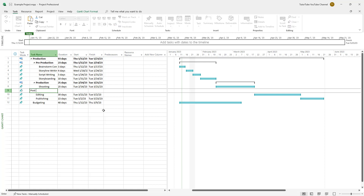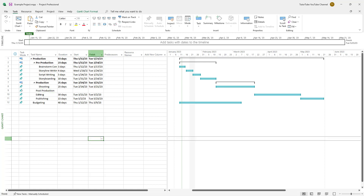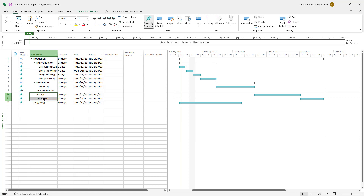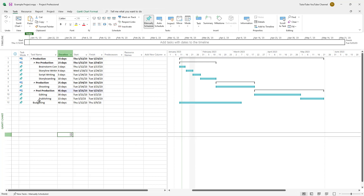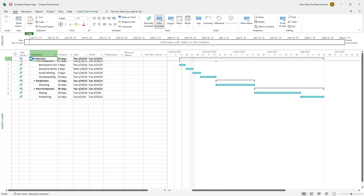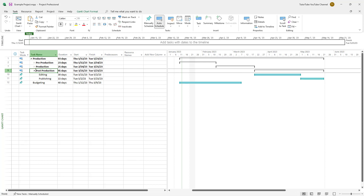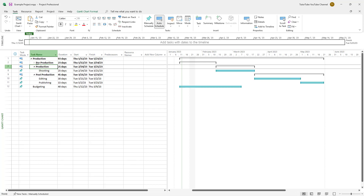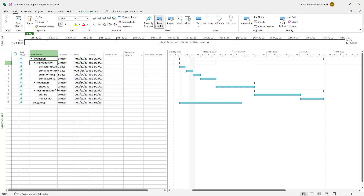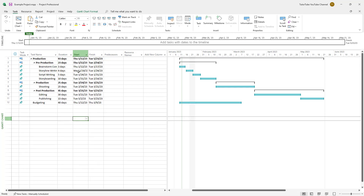I'll right-click, insert a task, indent it back, and name it 'Post Production'. Then I'll select editing and publishing and push them forward as its subtasks. Now you have Production at the top, with Pre-Production, Production, and Post Production beneath it, each showing the number of days and their own subtasks.